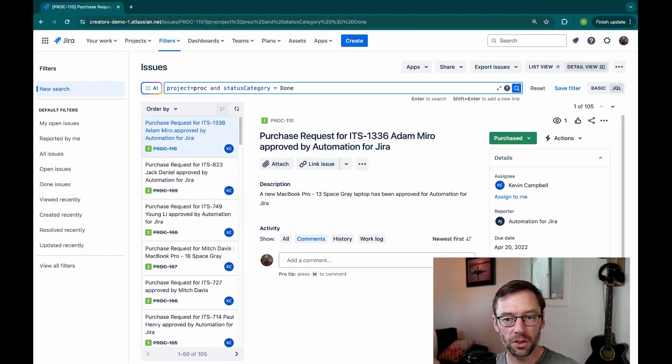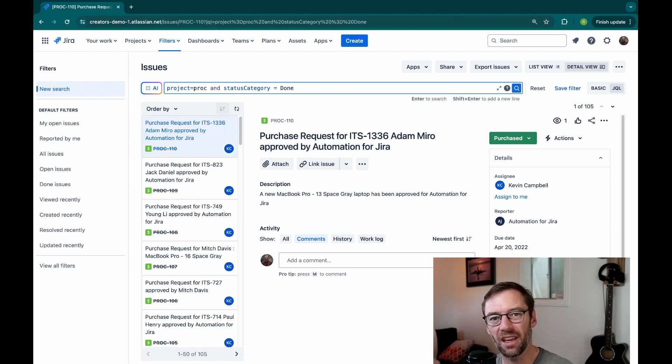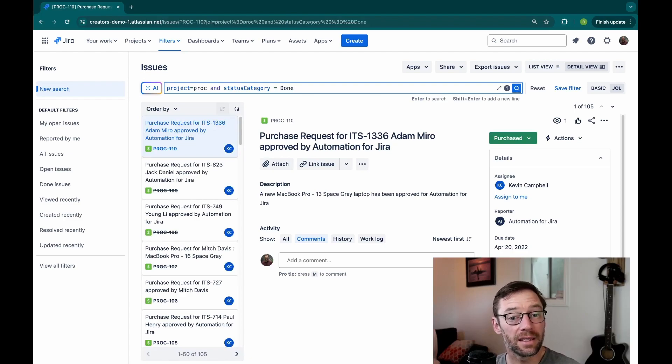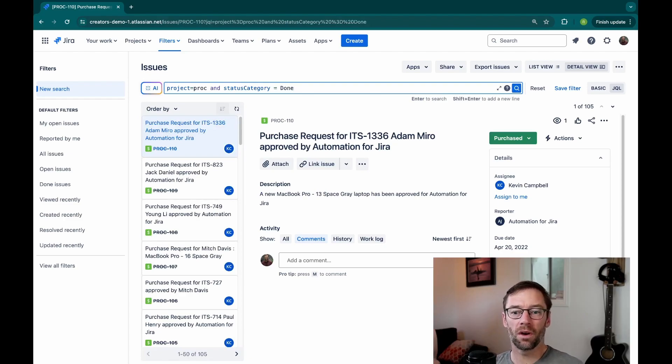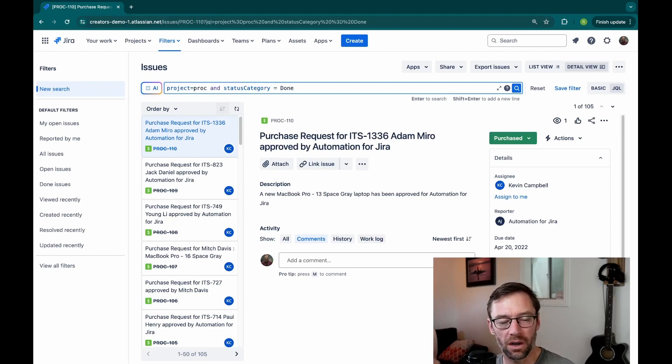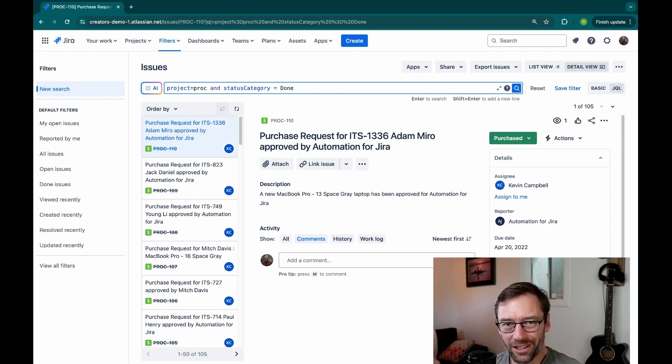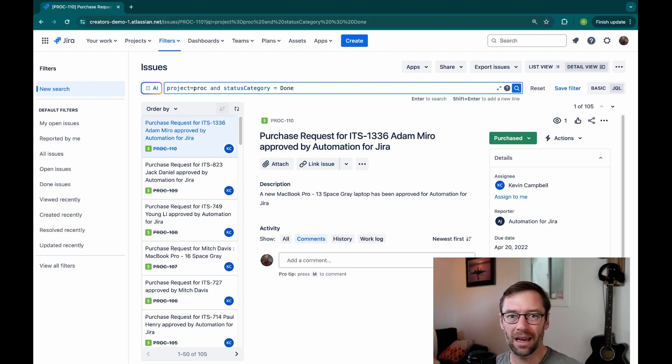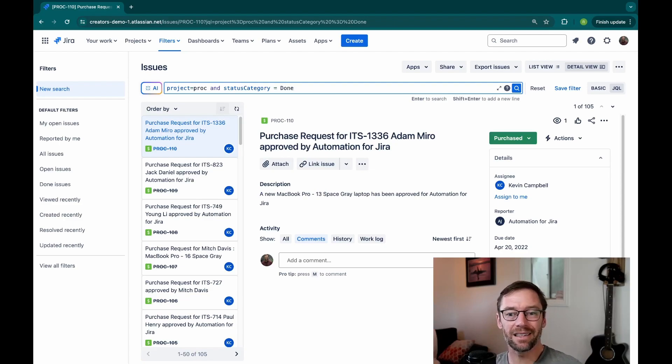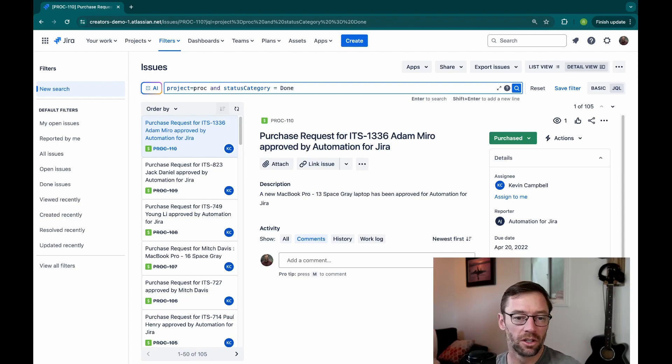And this will go through, and it's essentially the same as what I just had, except I don't have to know what all of these status categories are. However, the big difference is I don't have to know what every done status is in this project. Jira will just go and find them for me.